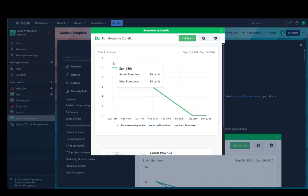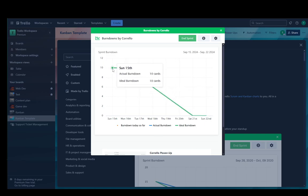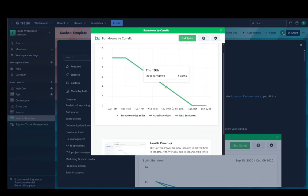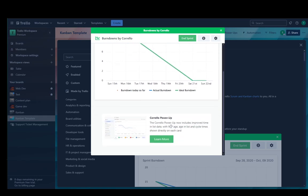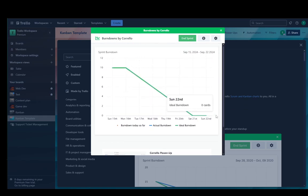As you can see, pretty much daily the amount of cards will go down and this is what your burndown chart is going to look like. This is what it's going to be like through the duration of your sprint.